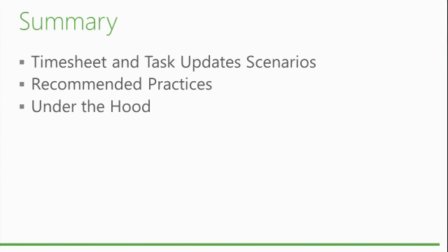I understood the compliance on the timesheet, your compliance report. Do you have any experience doing compliance on task updates? I want to know if somebody hasn't submitted a task update when they should have. Yeah, we have something that was done for 2007. It's called the report pack. It has an example of both a task update report and a time compliance report that you can download, with a few modifications. We have not updated it yet for 2010 because we need to revisit a lot of the reports, but it should work for most of them. Specifically, the task update and the time compliance have not changed a lot, so it should be okay.